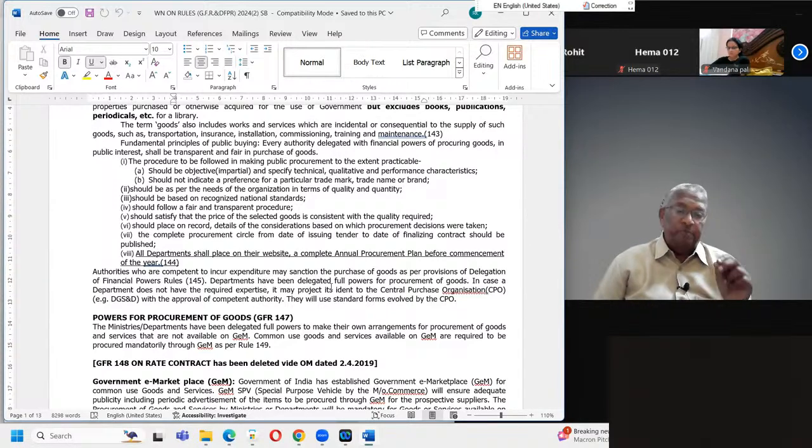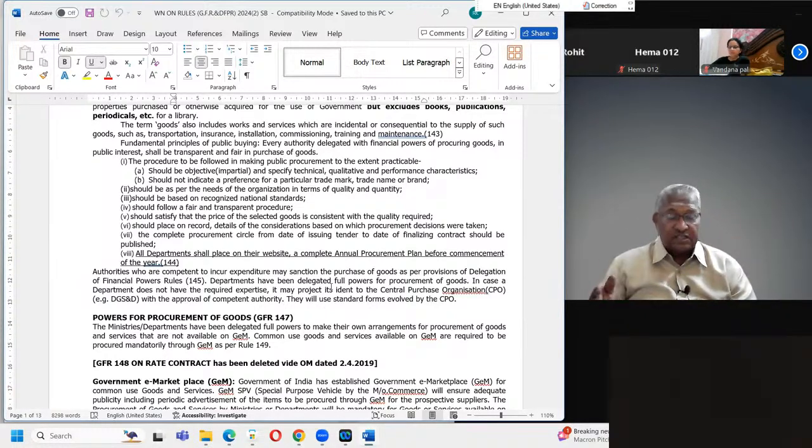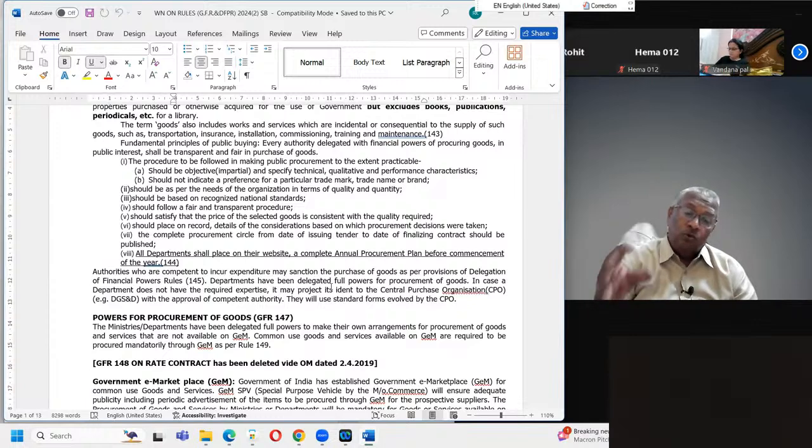Then when you open, you will open, and ओपनिंग का भी प्रोसीजर है. ये सारा ट्रांसपेरेंट के बारे में, फेयर प्रोसीजर के बारे में जब डिस्कस करते हैं उस समय बताएंगे. देन ओपन करने के बाद फर्स्ट ऑल द टेक्निकल कोटेशंस, technical bids will be separated. First, they will be studied by an expert or expert committee. उसको देकर हमारा स्पेसिफिकेशन, टेक्निकल डिटेल्स, जिस टेक्निकल स्पेसिफिकेशन के साथ हमें ये मटेरियल चाहिए उसके बारे में उन लोग क्या कोट करते हैं उसको स्टडी करेंगे.